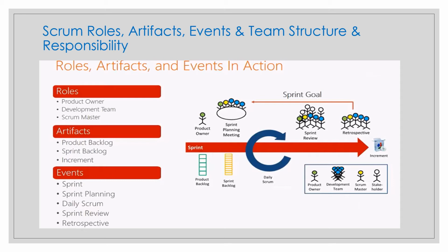So what are the four parameters which are very mandatory? Within the sprint, there should not be any changes that would put the sprint goal in danger. The thumb rule is the sprint goal should not be in danger anytime. There should not be any compromise on quality, and it should not get decreased. Third, product backlog refinement can be done anytime whenever it is required. Even scope may be clarified and renegotiated with the product owner, as more is learned by the Scrum team on the product.